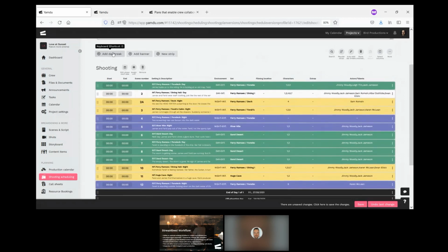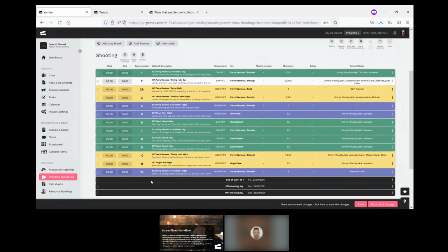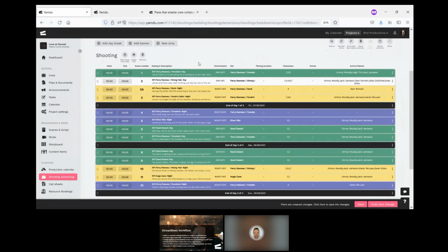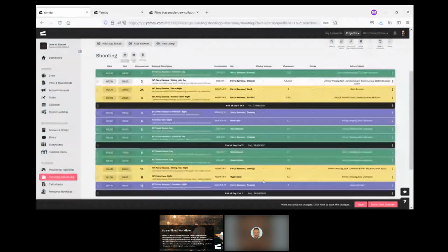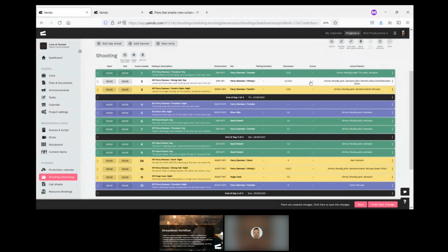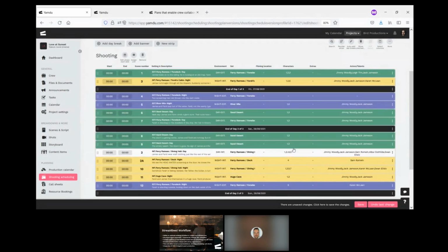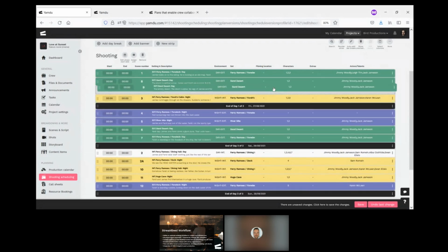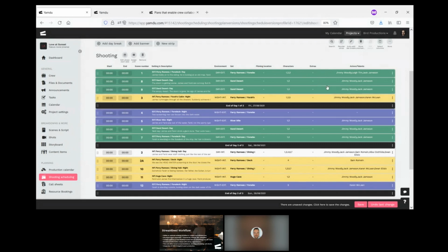You can say, okay, this is a 3-day shoot, and it's going to look something like this. So I just select the scenes, and let's say, okay, it looks something like this. We have a 3-day shoot. But what if Sam Romaine is not free on the first day of shooting? Well, then I can move his scenes to day 3 instead, for example. And maybe if I do that, I can then substitute a couple of other ones according to whether or not that might be something possible.